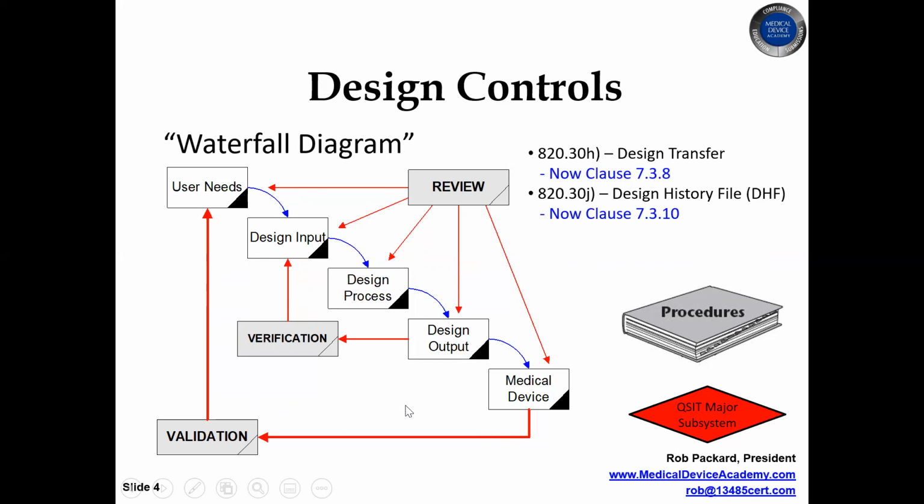But the important thing to remember here is this is a process, and it doesn't necessarily go one direction downhill. Just like if you had a dam, it can pump things back up. We have design outputs, you perform a verification test to make sure it meets the design inputs. If it fails this test, if it fails your verification test, then you have to go back and update your design inputs.